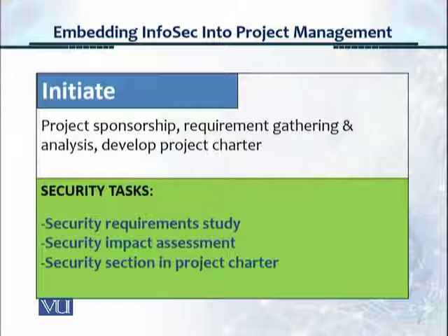Now, the security tasks while the initiation is happening for the project are: we will conduct a security requirement study, and this will be a high-level study. Where will the software be used? What are the purposes? What is the impact that security incidents may have on this particular project or the outcome, which is the product? Then we will do a high-level security impact assessment as well. We will try to understand the nature of the software or the product or the project, what type of impact it could have on the organization, and what type of security measures would be required based on those impacts.